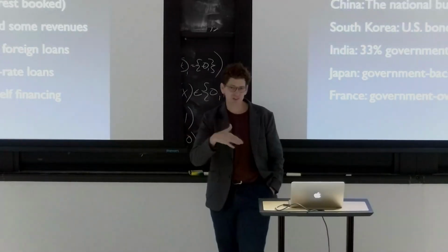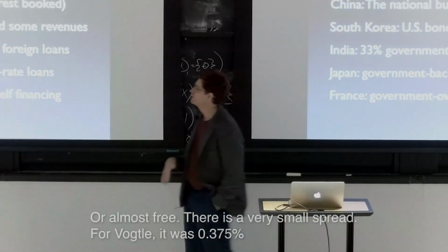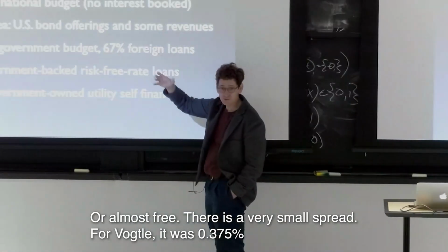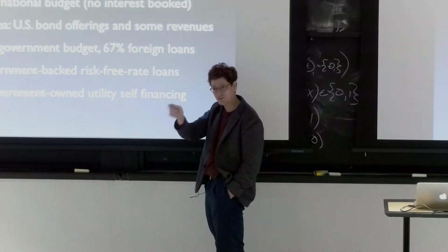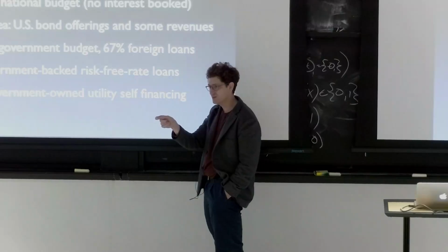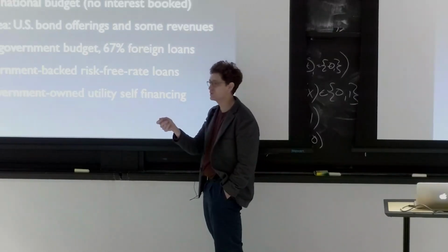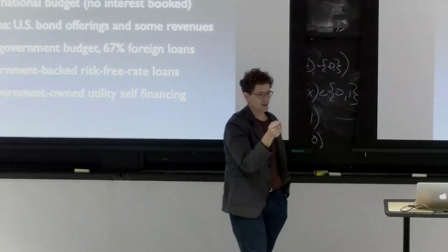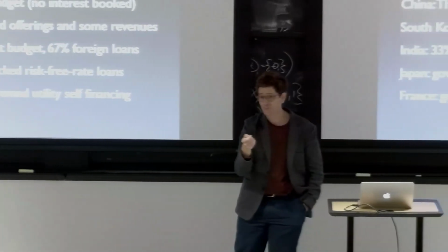So it's essentially money from the government for free. I mean, they have to pay it back, but they get to borrow it for free. So that delay in construction that leads to that inflation of cost doesn't matter anymore, because the multiplier on the overnight cost essentially goes to unity.